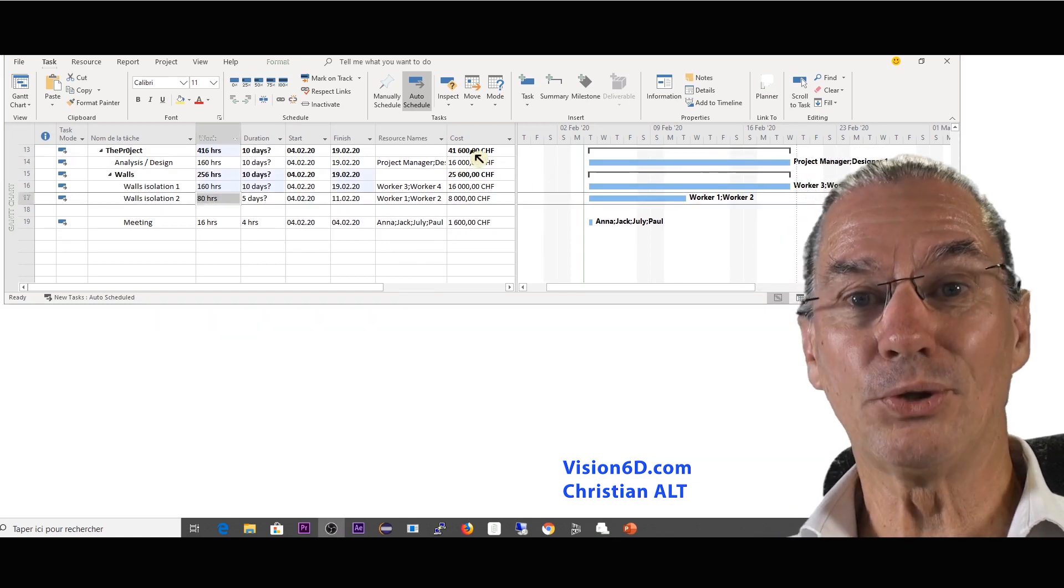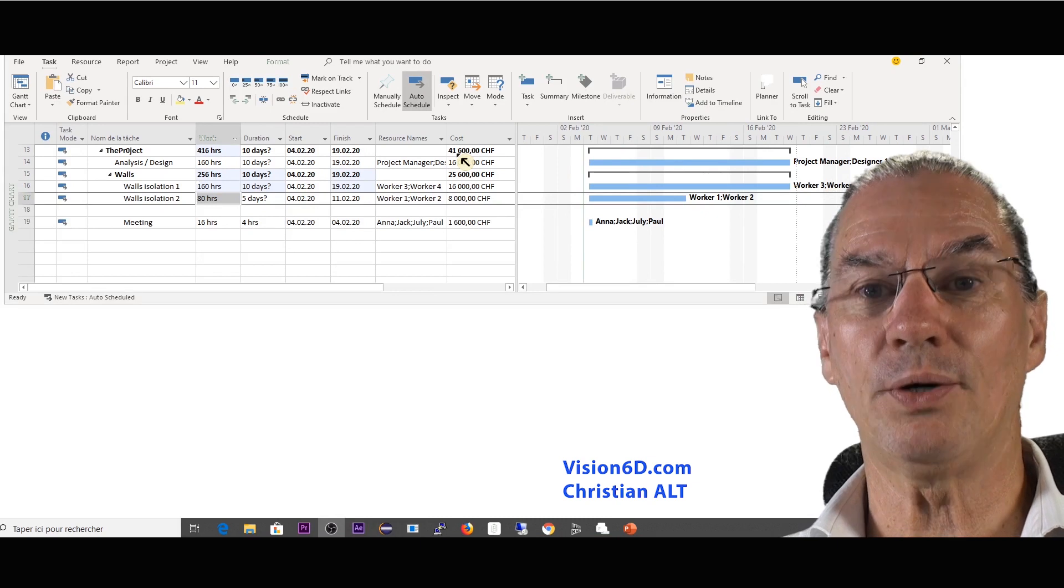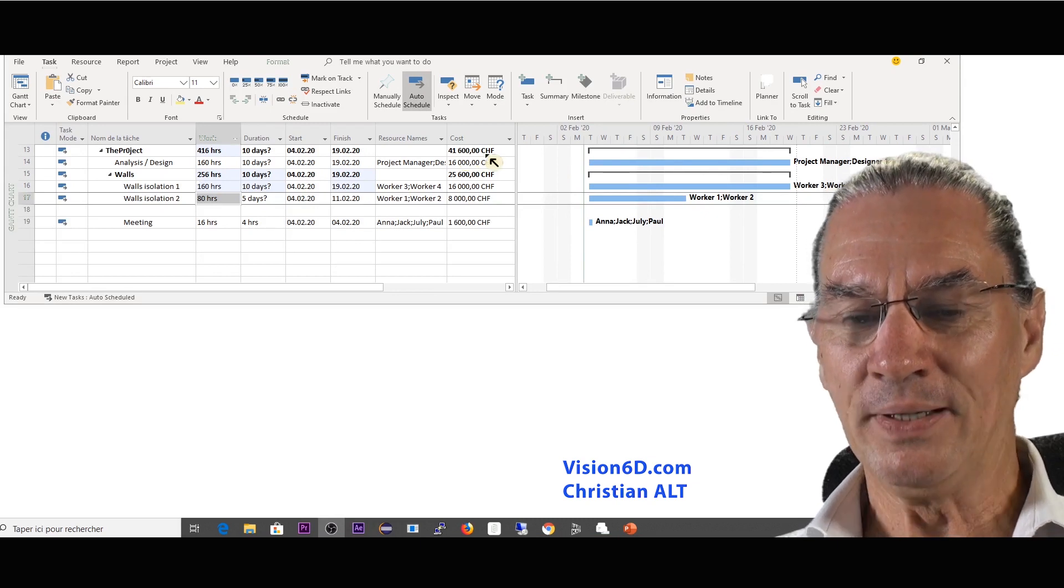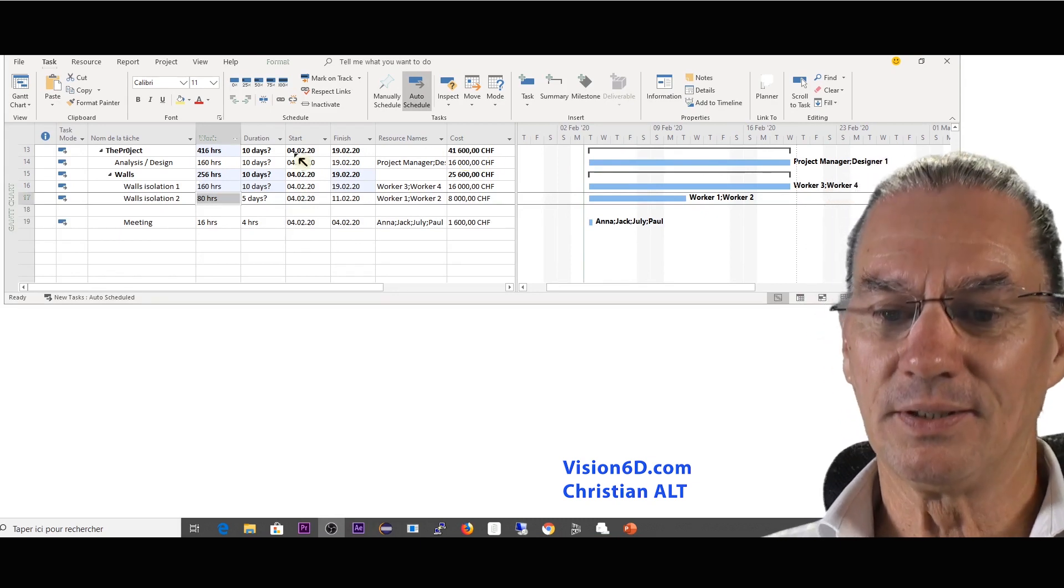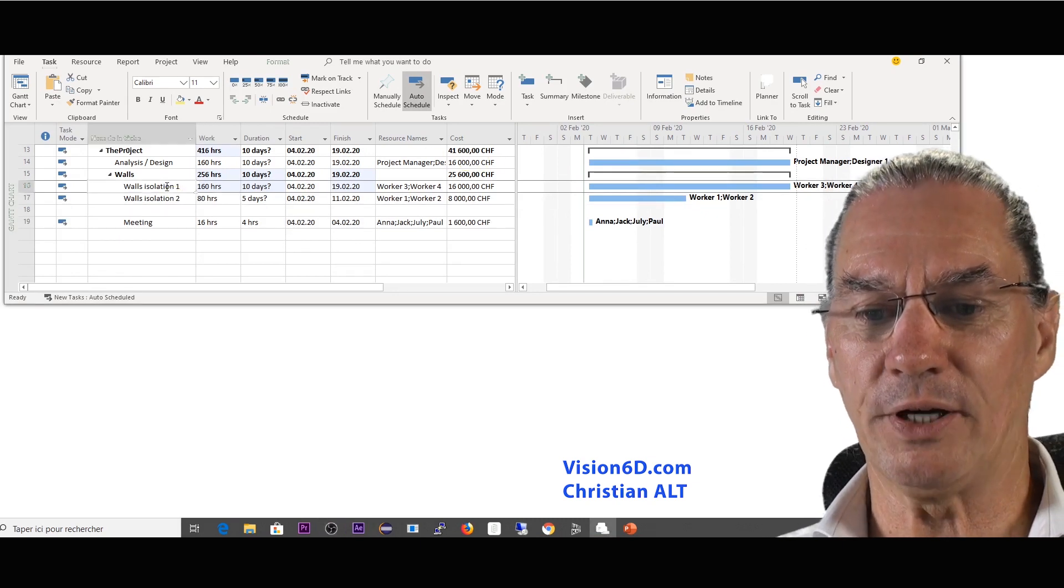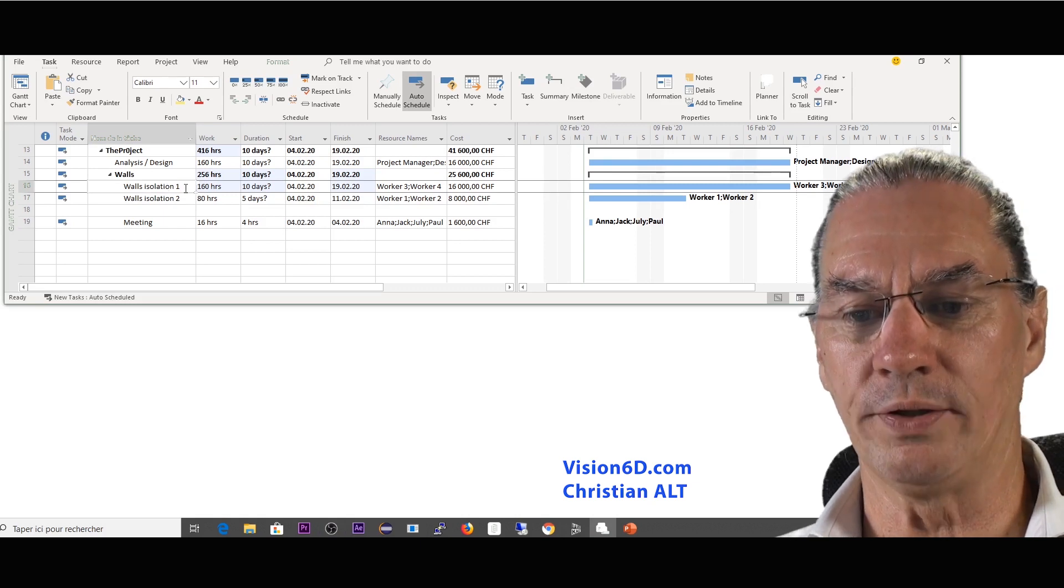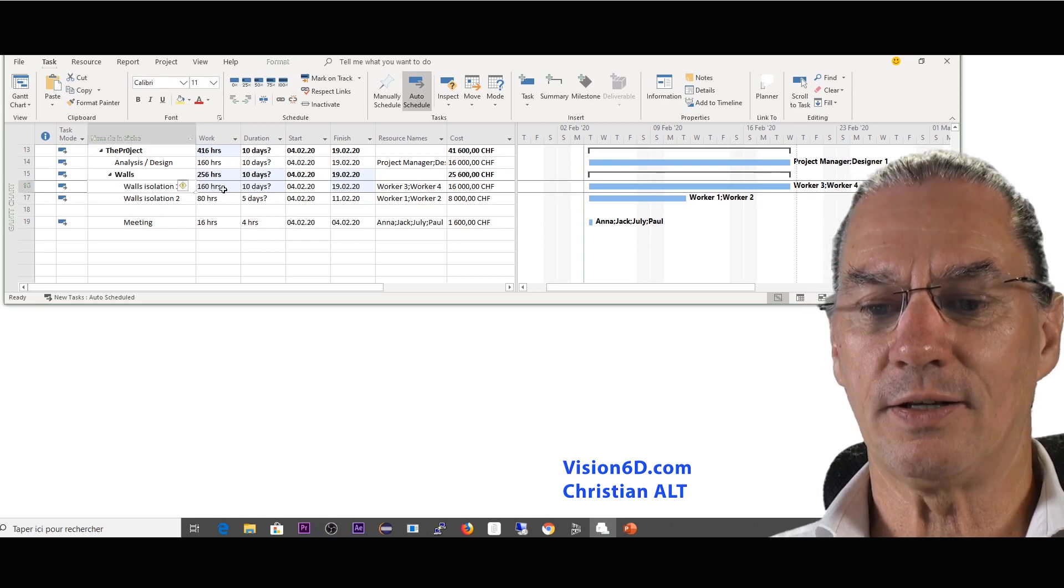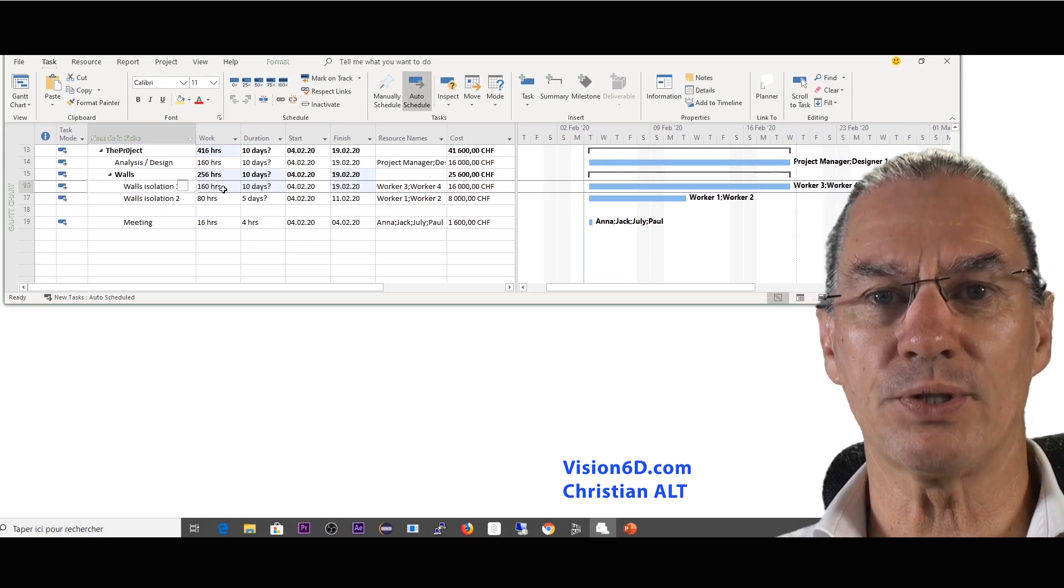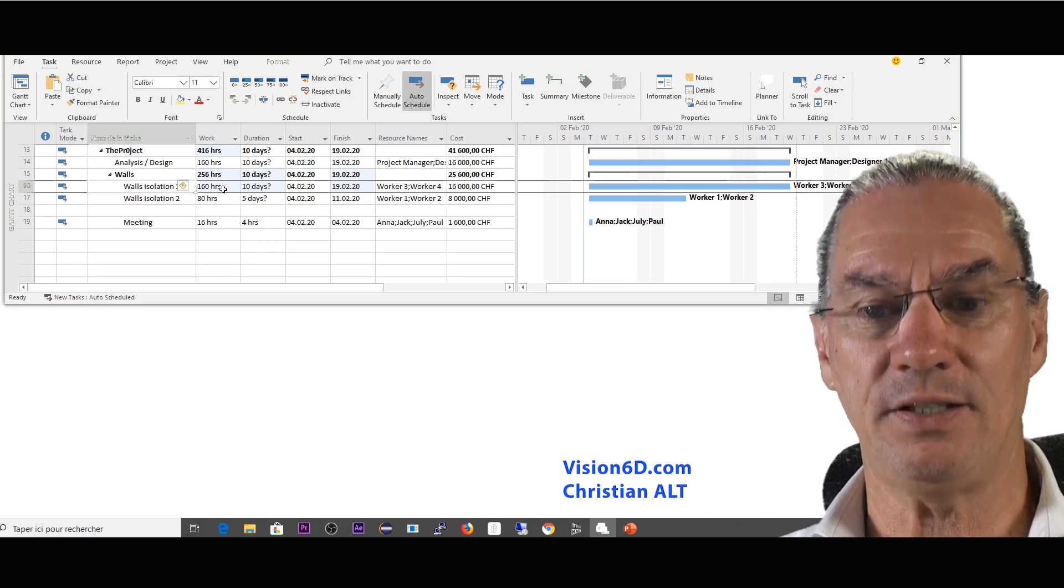So the cost of the total project is 41,600 but it's not really the right price because wall isolation one is counted as 160 hours although it should be just 80 hours.